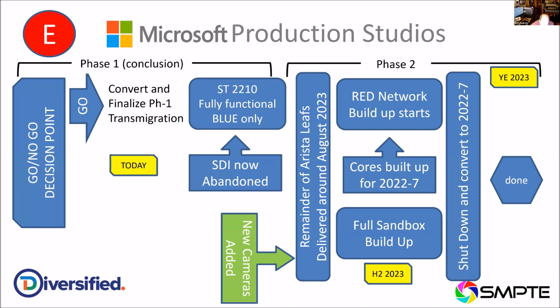There are service windows that we had to define also as part of the planning, not just for the build portions of it, but for the long-term maintenance and commitment of the facility. Like other large facilities, CNN, HBO, ABC News, things like that that are going or have gone to IP, they literally have an agreement with the major vendors to say, this is the window that we have open to make a change, to do an upgrade in the switch fabrics themselves, maybe the EOS system, the AMCS is what Arista calls it. And the period is maybe a 3-week window there where we can take portions of the facility down, or we can work only on the red network and not the blue, things of that nature. Almost every major facility of any scale has to do this. And this is why the integration of the vendors, as well as the integration company and the end user, the owner, all are in continual lockstep with each other.